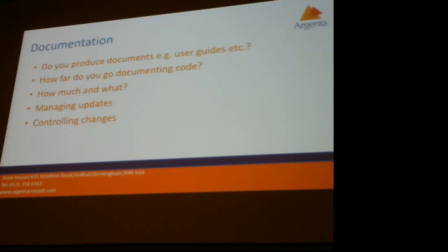The big thing for us is we also get a requirements coverage score from it. As you go through these TRL stage gates, you can say, we've got 45% requirements coverage at this point, which shows how much work we've done, because you obviously pick up all the easy ones first. Then at the end you can say, what's your level of confidence in this? Like, we have 75% requirements coverage at this time.